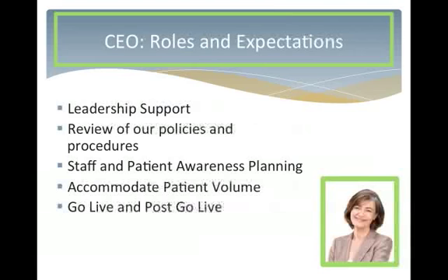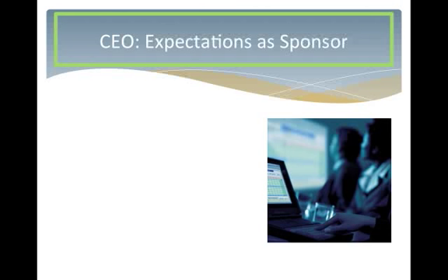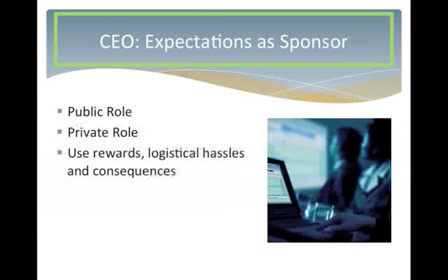As a sponsor of the project, I am the individual who can approve or legitimize the change. As a sponsor, I know I have a number of roles. I have a public role, showing my support of this initiative to patients and to the staff. I also have a private role with my leadership team supporting the same message. The ability to use motivational rewards like free lunches, to minimize logistical hassles like removing paper prescription pads, and establishing consequences, performance improvement plans for stragglers.